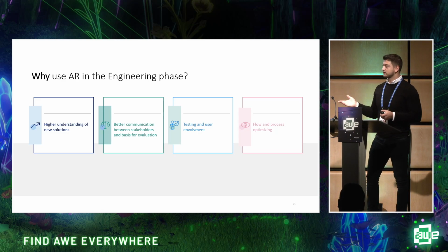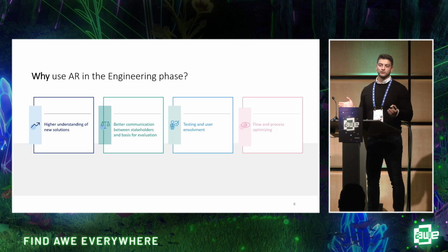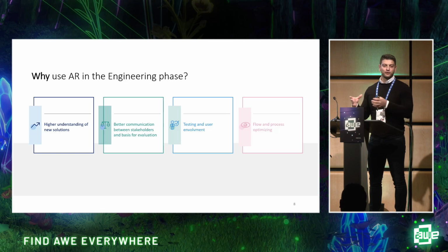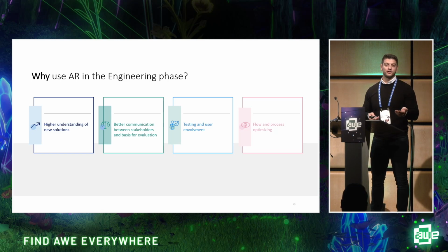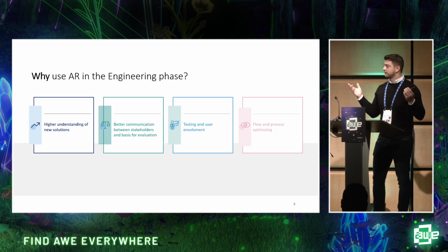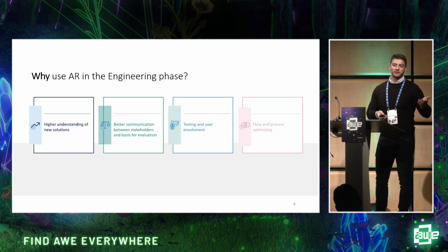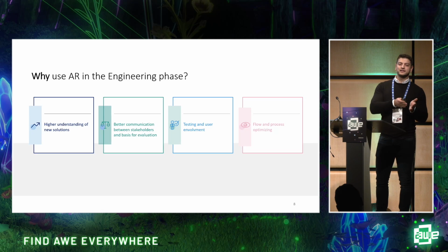And we had a project where the room was too small because they had sent the wrong 2D drawing of the room to the supplier 1.5 years ago. And this might be like, that's very, very stupid. But that's not the issue. The issue is not that you're making a mistake. The issue is that you previously didn't have the tools to check if you made mistakes.